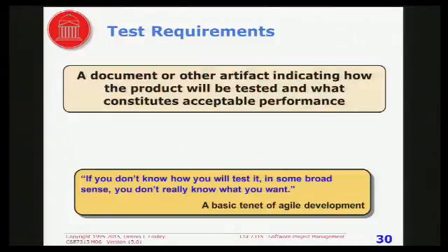One of the most important things to keep in mind when you're developing requirements is to know what you're going to do to test that you satisfy the requirements. Sometimes these are called test requirements. There's other words in use. The point is, it's something that says, how am I going to test to make sure I satisfy the requirements.